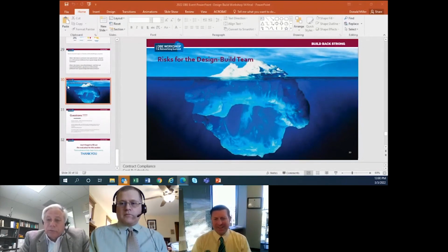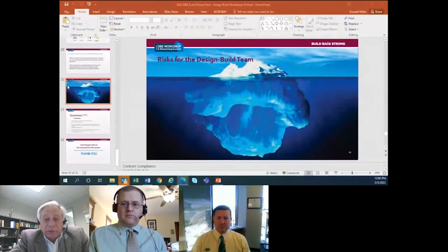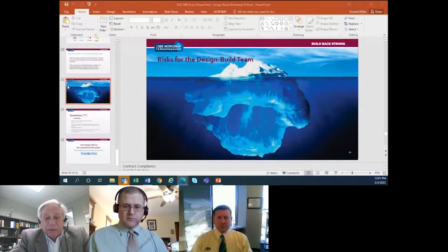Sure. Every project is different. What we try to do is be equitable based on the percentage of the effort involved. When you see the effort involved, it's quite substantial. It is not unusual for us to spend $100,000 in direct labor on a design build pursuit. We have detailed information on it, and we track pursuits throughout the company and develop databases. So even without looking at a set of plans, we can go into our database and come up with a pretty good estimate of what it's going to take.